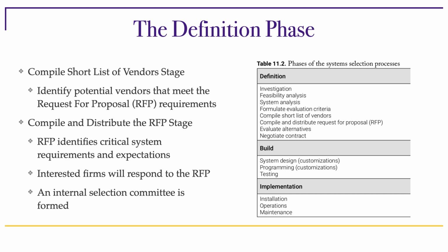In other words, you shouldn't just go out to vendors and have them pitch you software for your problem, but you should actually give them a template of exactly what you will evaluate and how you want them to respond. This is important because it will make the comparison between the different responses very, very simple, or simpler, I should say.